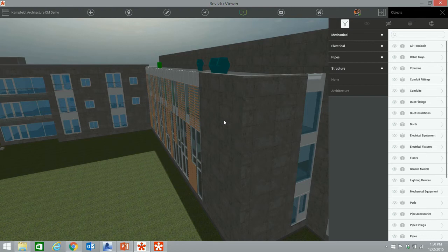So it's basically setting up each of those buildings, or a series of buildings that are connected. Like in that first example that I showed you, there were 3 buildings, and it handles it just fine even on the iPad. But if they have a specific building that has 5 different disciplines in it, it's easier to export that out as a single building. So if they're working on that building, they just go into that project. You can very easily open that up and have it stored locally on your iPad, and it runs just fine because it's only rendering that smaller portion, one of those 30 buildings.